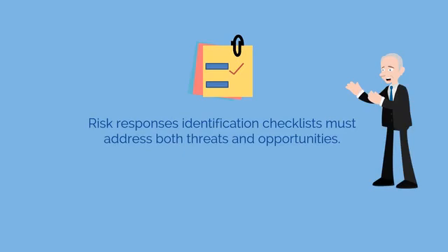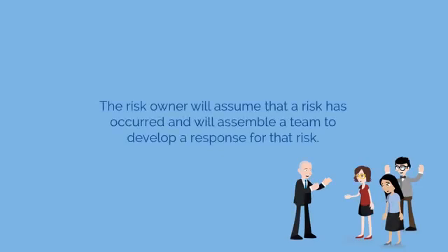The third technique is contingency planning. In contingency planning, the risk owner will assume that a risk has occurred and will assemble a team to develop a response for that risk.